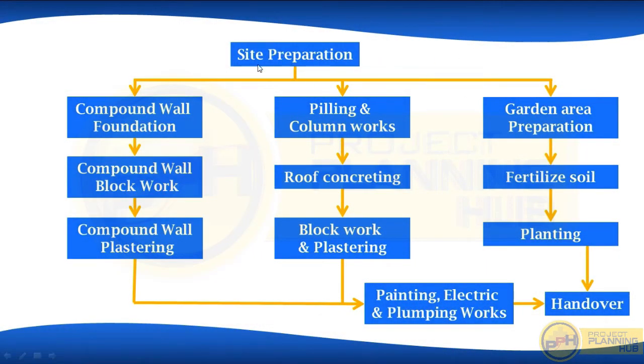First activity, site preparation. Now, after site preparation, three activities will start in parallel. First one, compound wall foundation works. Okay, so foundation works of compound wall. Then piling and column works, the building basement works. Then garden area preparation, preparing the garden area.